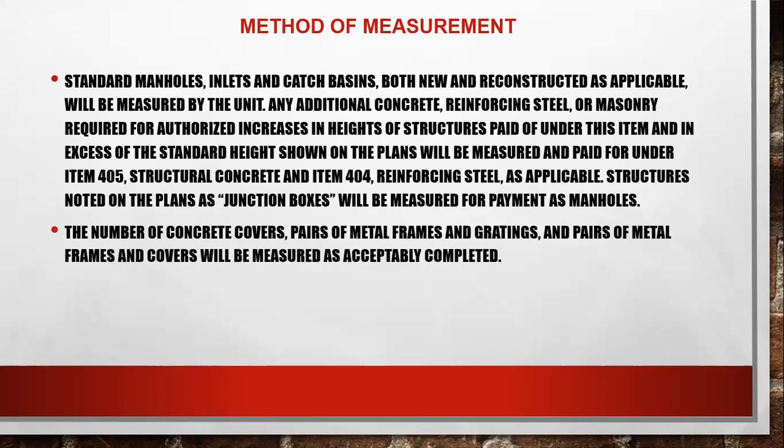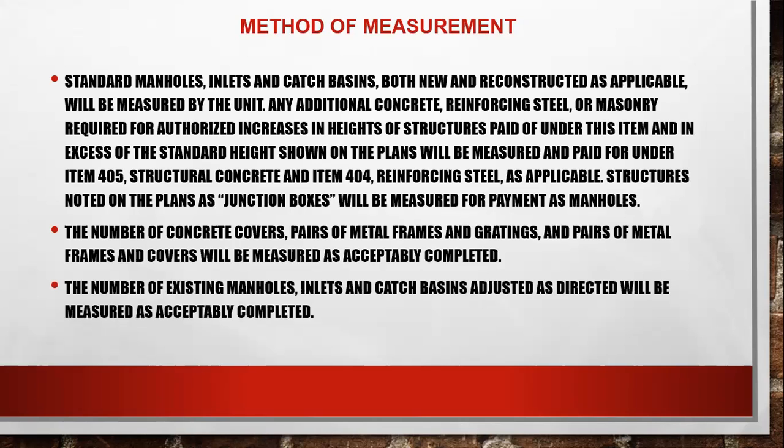The number of concrete covers, bases of the material, frames and gratings, and piers of the metal frames and covers shall be measured as acceptably completed. So the cover should be fitted. Of course it should fit, otherwise it won't work well. Next, the number of existing manholes, inlets and catch basins as directed will be measured as acceptably completed.